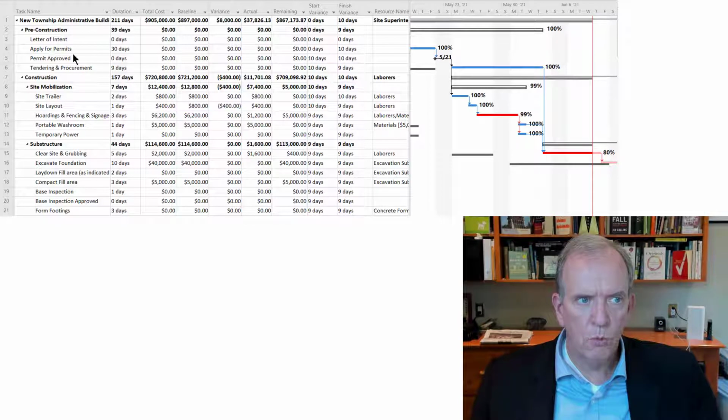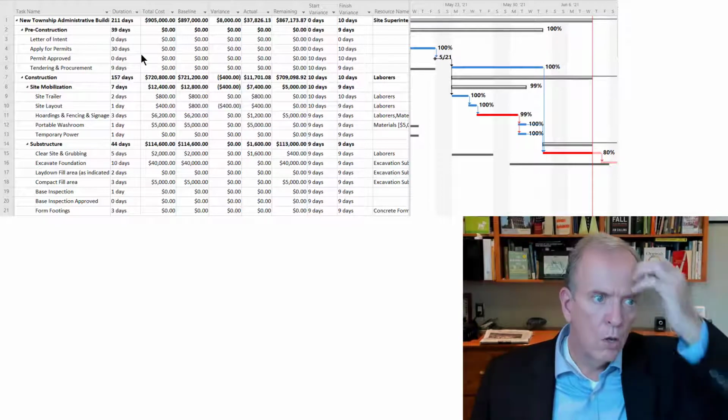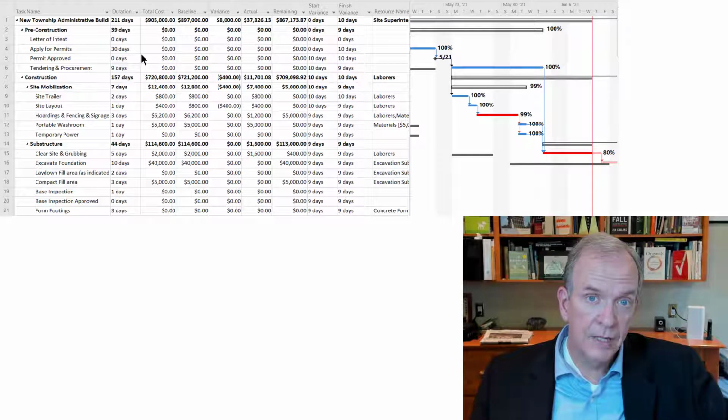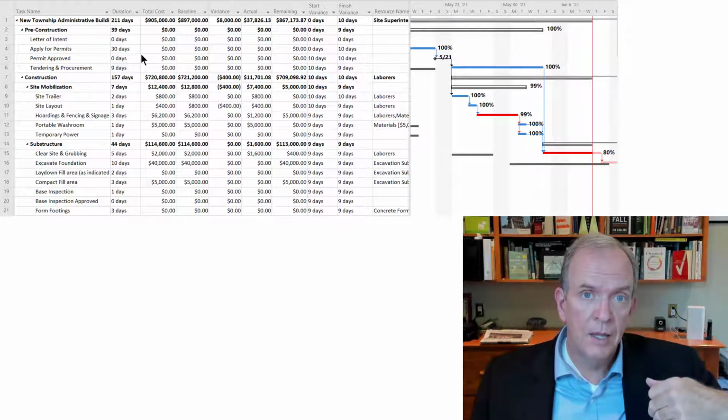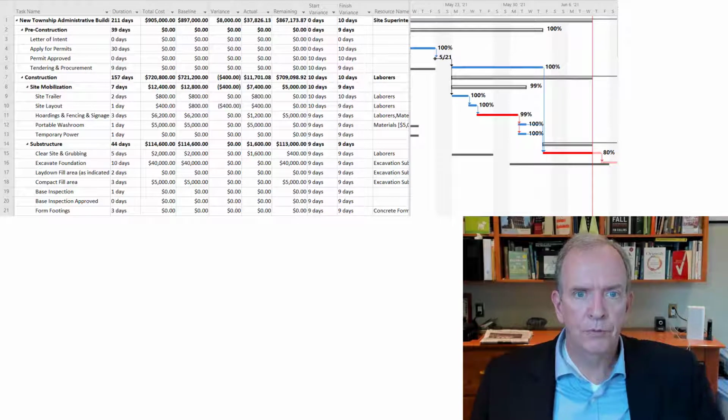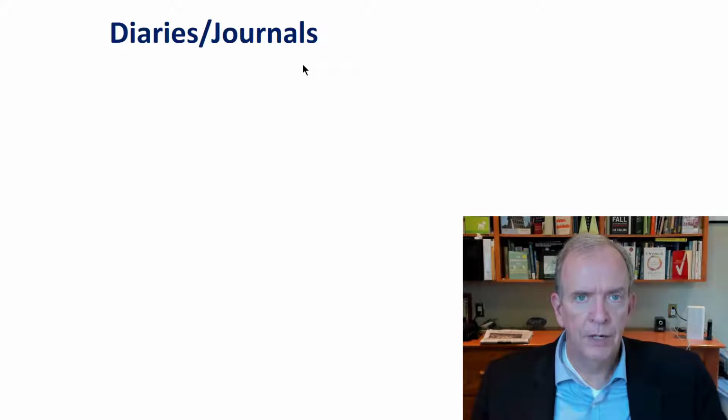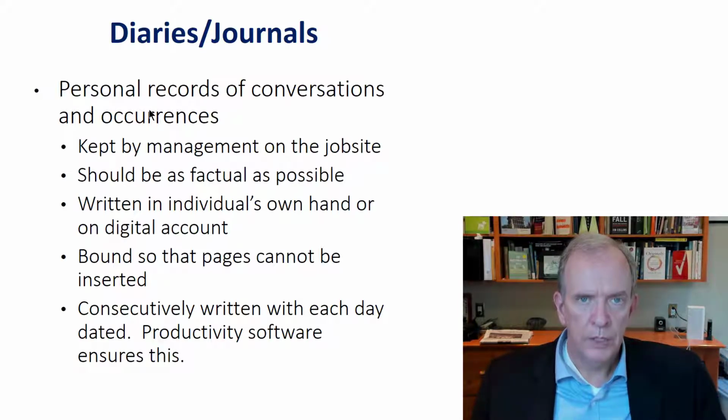So the question is, well, why was this 10 days? Were we 10 days behind in submitting the application, or were we 10 days behind in getting the approval, right? So we'd want to look at that. And then we discuss it and figure it out. If it's our fault, then it's our fault. If it's a third party, then again, we might have a good avenue for an extension. Look at the contract, look at what the documentation says, and then take the best approach to resolve the issue. Understand where your client's coming from. If they're time-oriented, try to work out a workaround that will appease them.